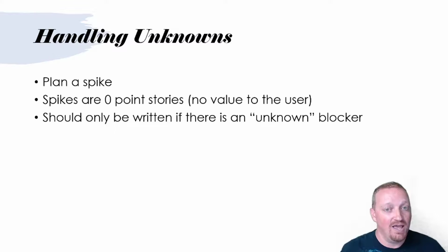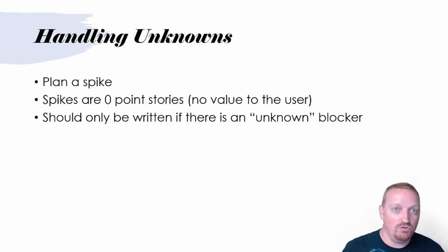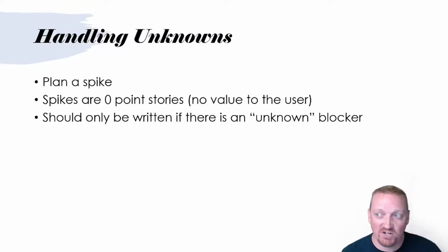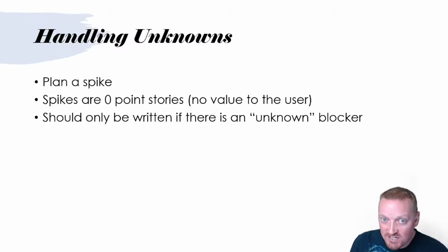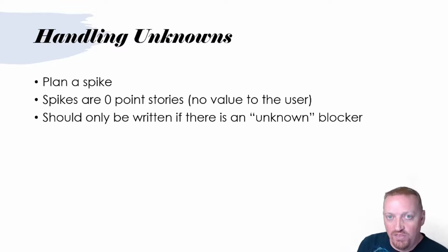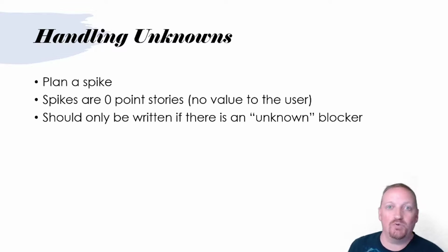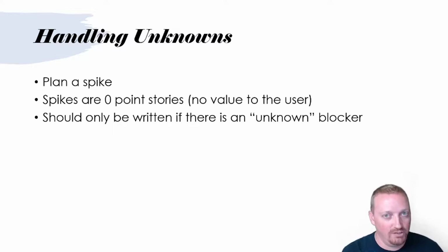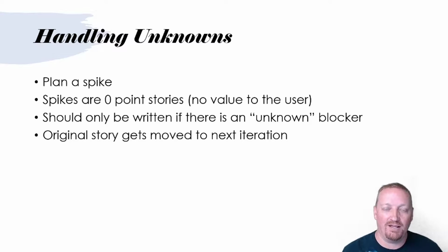Maybe your organization says, hey, everybody gets an hour or 2 every day, or an hour or 2 every week, to do this kind of spiking exploration, but we're going to track it as a spike. That's entirely possible. But I want to be clear that any spike, this exploration of the unknown, should point back to a story that does provide value to the user. So even though this effort of exploring does not provide any direct inherent value to the user, that doesn't mean it isn't associated to a value to the user. Okay? There's a little bit of a distinction, maybe a distinction without a difference for some people, but I think it is important, at least to keep things categorized and simplified.